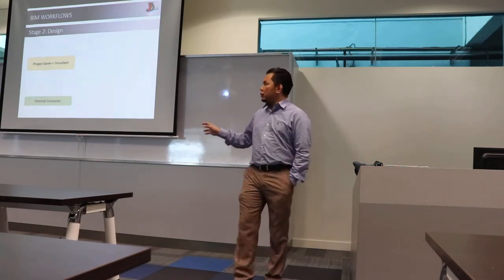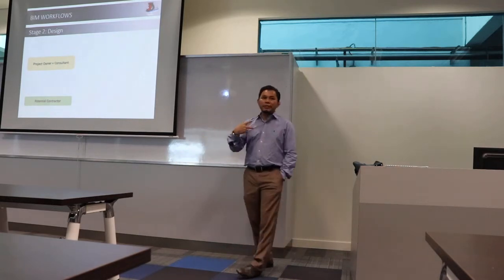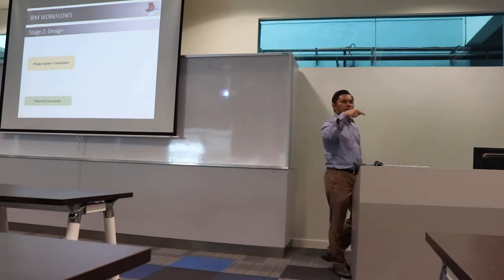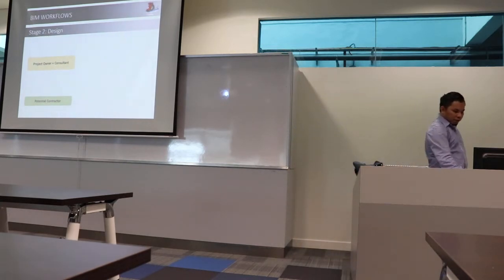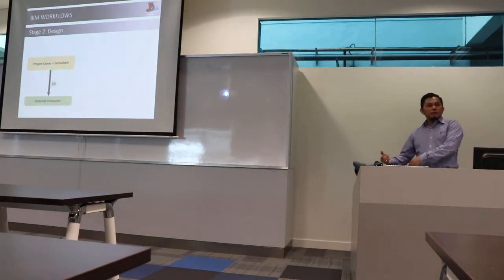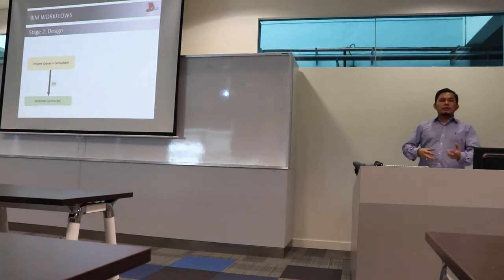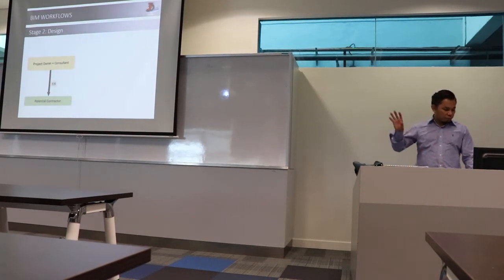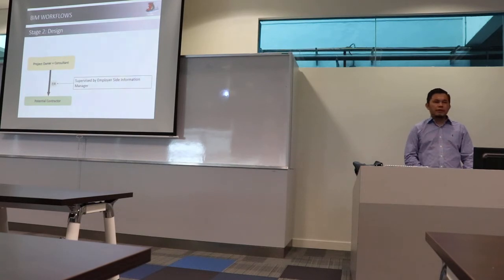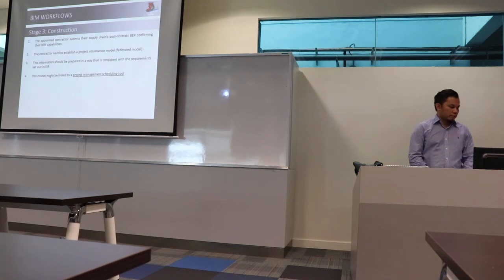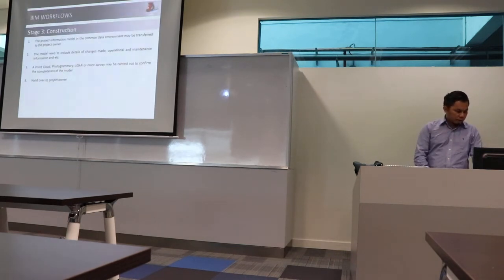They call it a multi-party contract under AIA PDP contracts. So that's why in Malaysia normally we do two-tier BEP. One for the consultant, the other for the contractor. The BEP for the contractor is basically whatever the consultant discussed with the project owner, put into the contractor, and then they need to reply back. Same thing, so you have the EIR and the BEP.